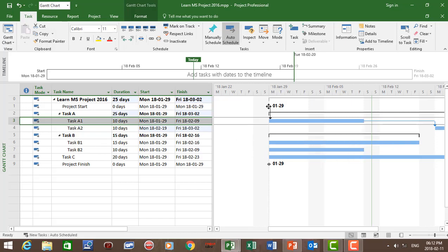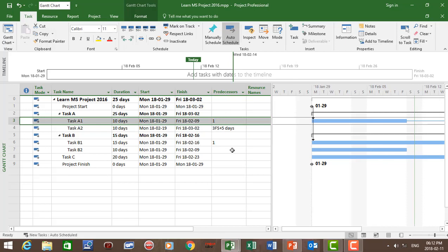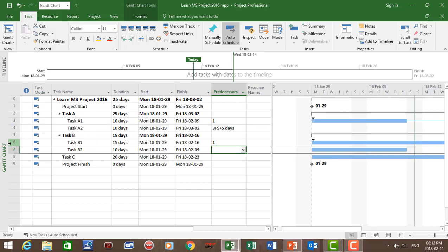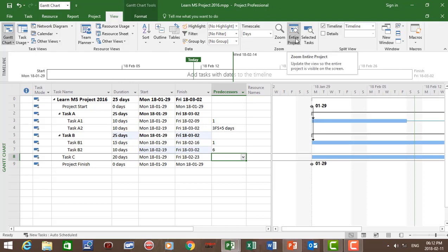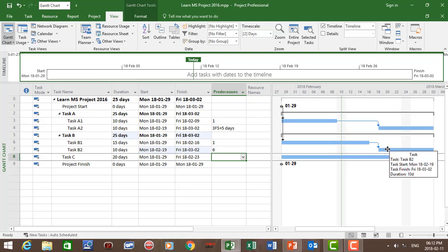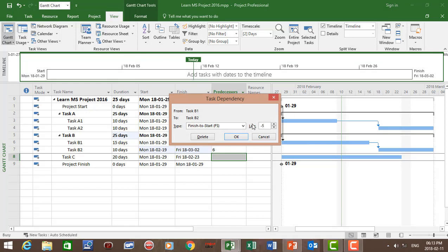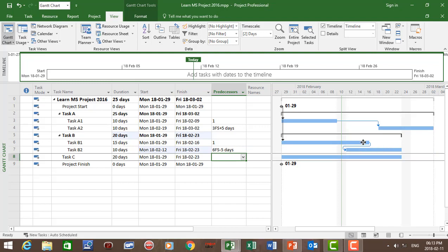Task B1 is going to start when the project starts. There's a finish-to-start relationship between B1 and B2. You can either drag the bars or go to the predecessor column — Task B2's predecessor is B1, and you can type in the ID number, which is six. Now let's say Task B2 has a lead of five days, meaning Task B2 will start five days before B1 is finished. Click on the arrow and give it a lead of minus five days. So B2 will start five days before B1 is completed.